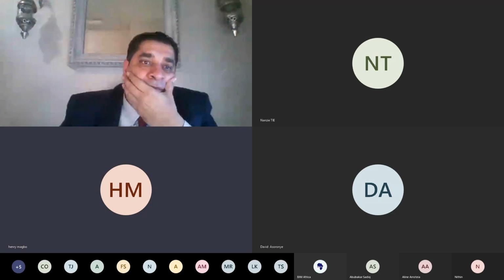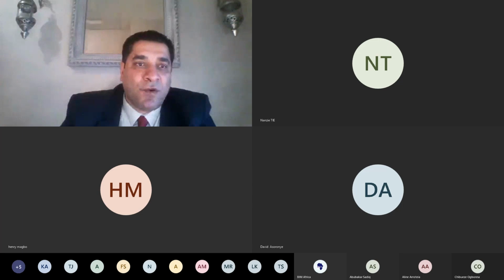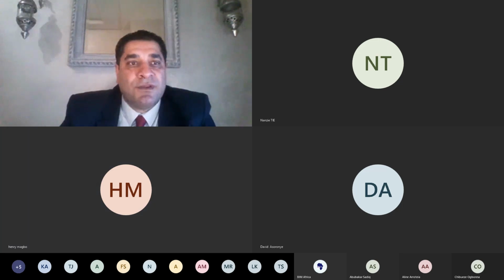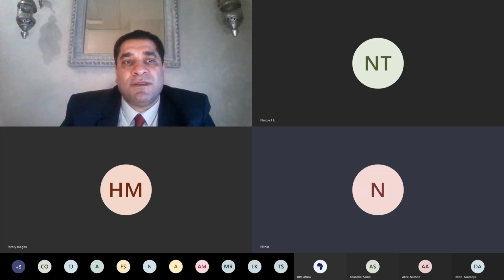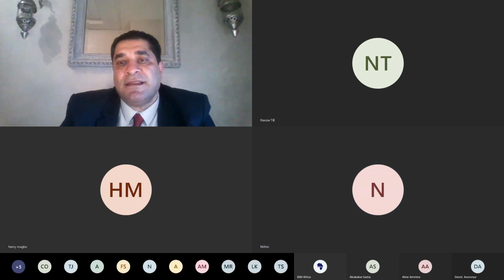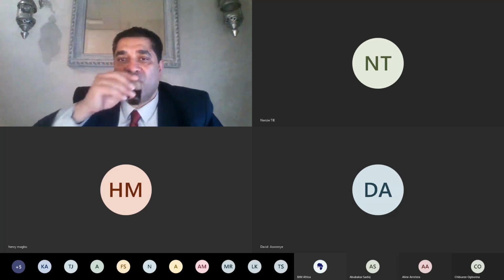This is the item and the activity, and this is the schedule. And we take this sheet. We want the result from Primavera, the start and finish day for every item, and export this to import it in Navisworks and connect between these activities and the items for the model in Navisworks. Okay?